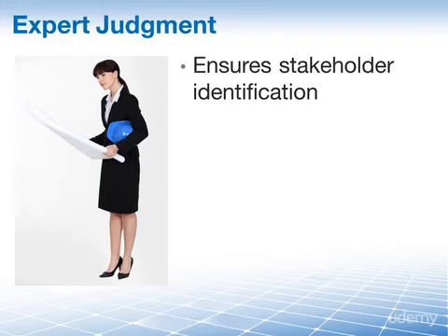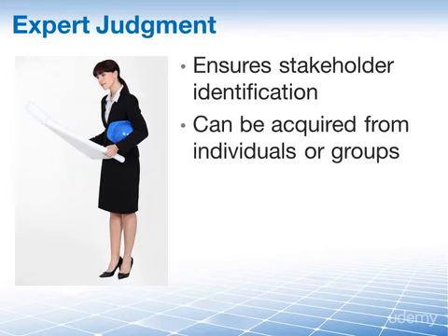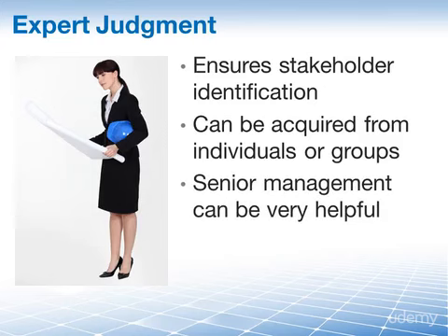added to the list. Expert judgment can be acquired either through individual consultation, like a one-on-one meeting or an interview, or in a focus group, a panel, or via a survey. For example, you could ask senior management who they consider to be key stakeholders on your project. Or you can ask your chief operating officers questions like, how do you think our project is perceived by the CEO? Is there room for improving our engagement with him? These are all very important questions, and you will use their expert judgment to get the answers.